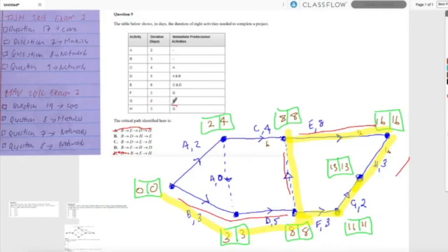H has an immediate predecessor of G, which has a predecessor of F. So this is, I'm calling it, another little dodgy question. The most correct, but it's not quite, is C as they've put. But it's not a true critical path, because E, 8, H, you can't start till 13. It's actually not a critical path. Weird question, but a good question for practice.